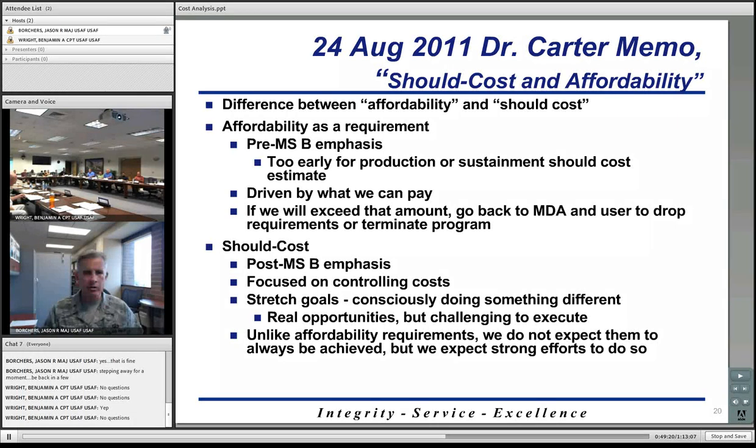So essentially you're dusting off that old cost estimate. You're making a few changes based on the differences between that program and your current program, or just using that cost estimate, that data combined with a bunch of other programmatic data to arrive at your cost estimate. So I think there is some element of dusting off that happens, and then you will use that data, or you might adjust it to come up with your current cost estimate.